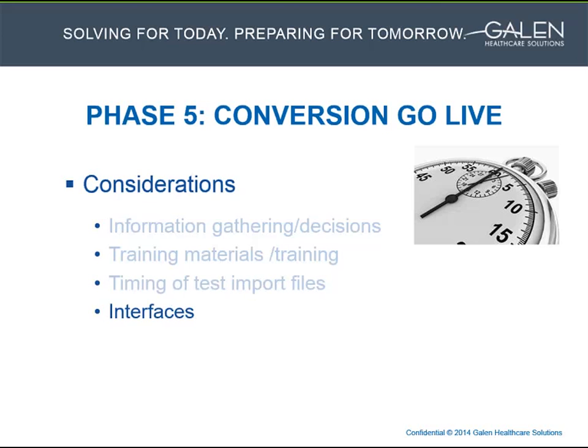Lastly here, I guess I have one more after this too, interfaces. As part of go-live planning, it's important to bring in the vendor representative to work out the cutover plan for the interface from the legacy EHR to the target EHR. Some considerations that need to be worked out include when will the last round of results be pushed to the legacy EHR, and will the timing of this allow for any subsequent results verification to be done, as we have previously discussed, if that's a requirement.